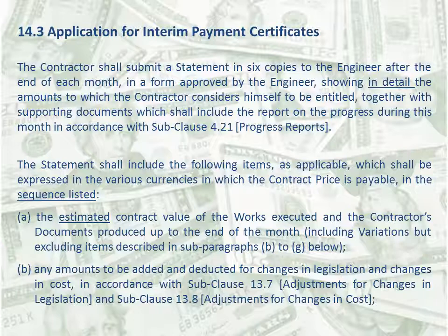And they're saying estimated contract value of the works plus amounts of money to be added or deducted in the order prescribed. Therefore, it should be in the order prescribed here. So when to start applying for monthly payments? It should be as soon as the contractor is able to do so, subject to the minimum amount stated in the appendix to tender.